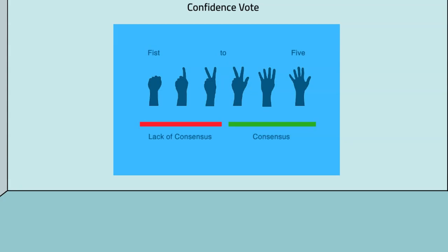And address those concerns immediately before we conclude PI planning. If we have completely 3s, 4s, and or 5s, then we will say there is a general consensus. And actually, we're in a very good place to start the PI, and our PI planning can absolutely be concluded.